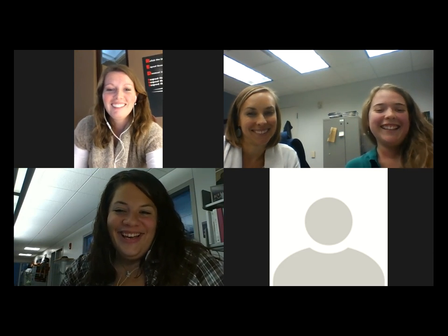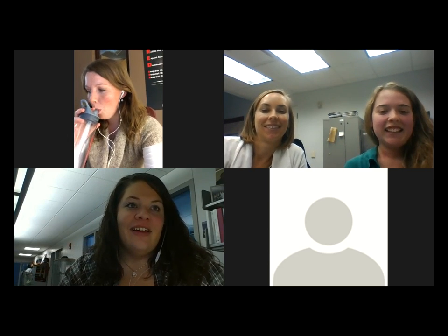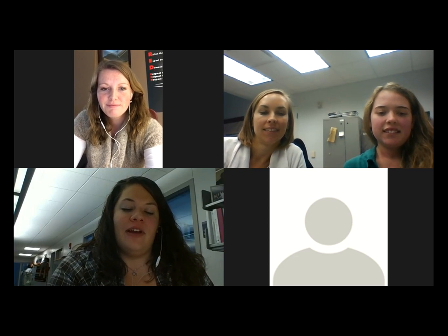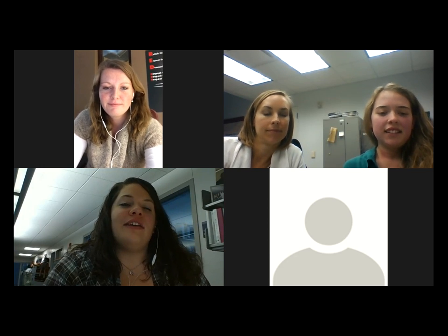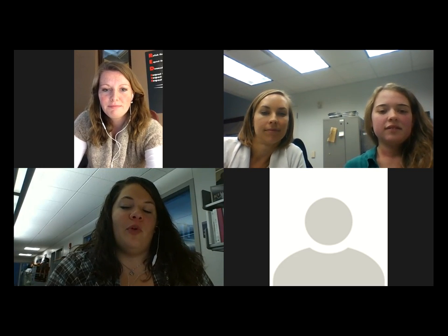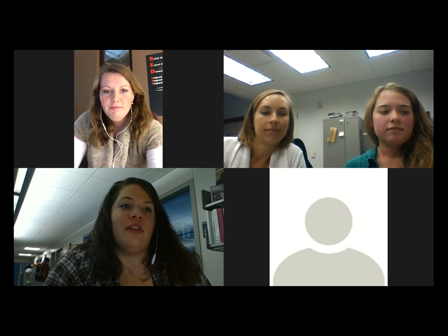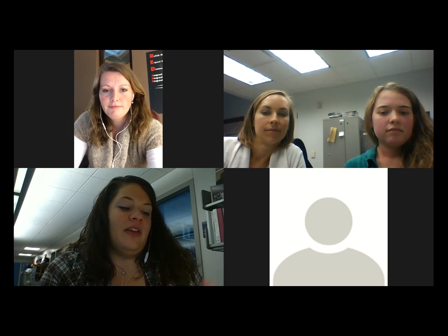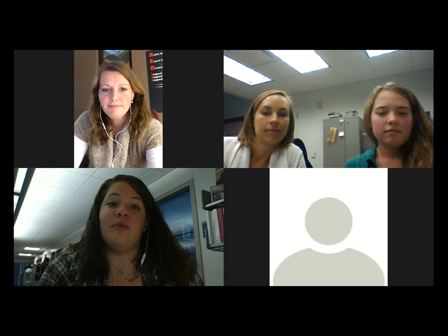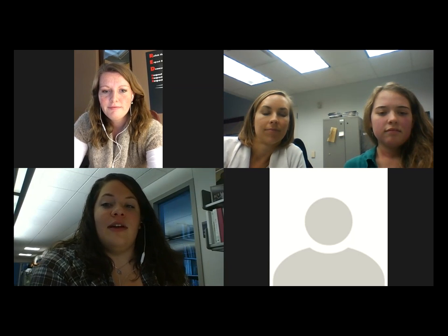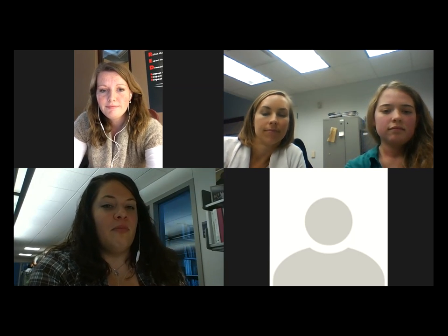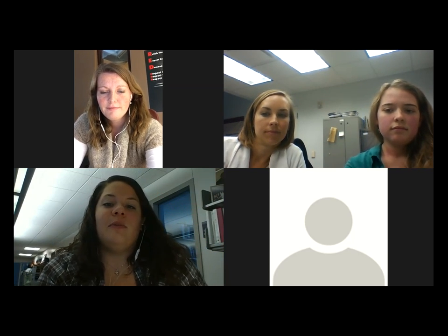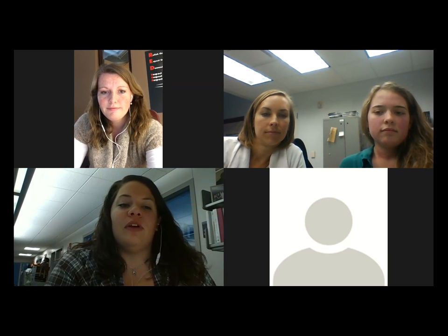Christina, do you have events? Well, when I was just getting started in this, we wanted to do something for the 9/11 Day of Service. And we tried getting a lot of different organizations involved, but there wasn't really a lot of time between when I started and the actual day of service. So looking at that as a learning process would be to make sure that we have set up at least a month, preferably more beforehand. Just a couple weeks wasn't nearly enough time to get the publicity and the people needed to really have a good impact.